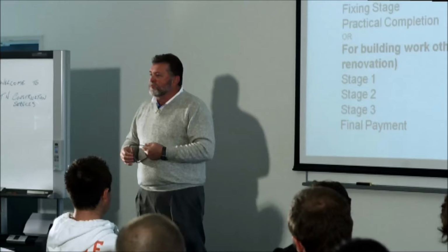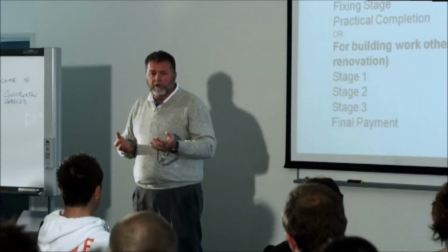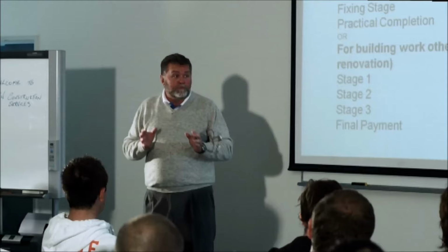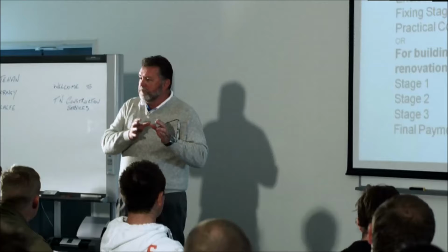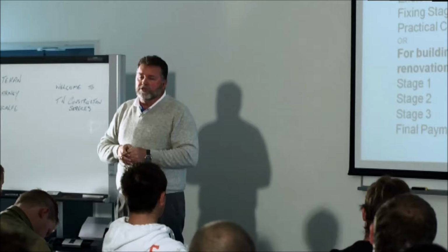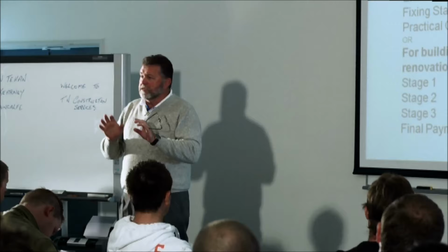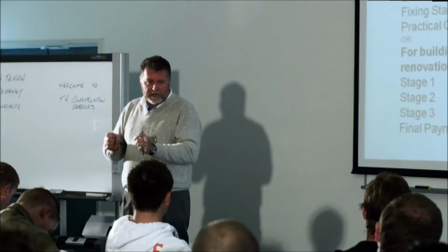Renovation work, especially when you're doing old houses in old areas, raises a lot of issues in relation to builder's insurance. Believe it or not, as the builder, you can't get insurance when you start to look at removing a house. The house removalists can, because they've got their own special insurance for that, but the builder can't. So the advice that we give is to get your house removalists to site the building on his pigs, on his stytes.